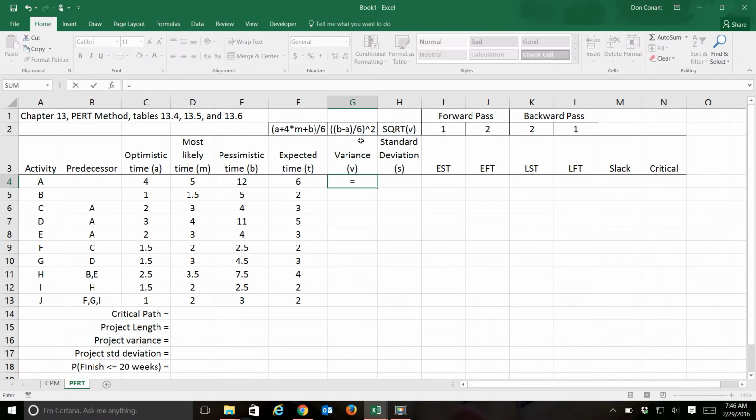So what we'll do is find our range, which means we take our biggest value and subtract from it our smallest value. That gives us the range of values. We divide by 6 in this case, and of course it's a variance, so we're going to square it. We want to take out the effect of negative values.